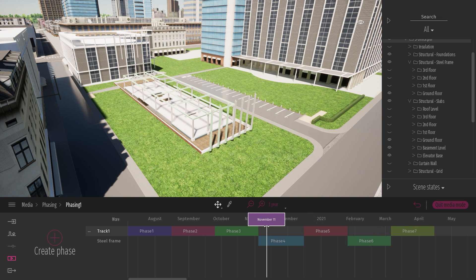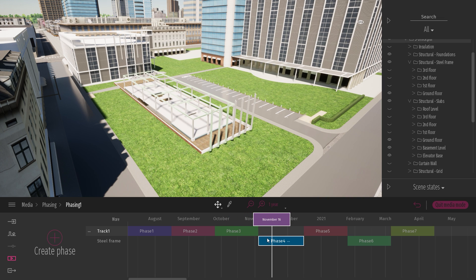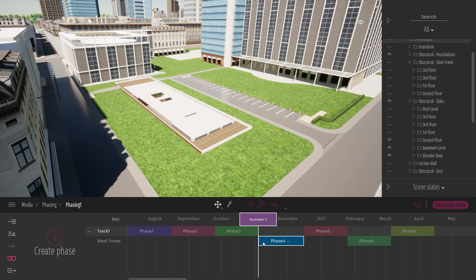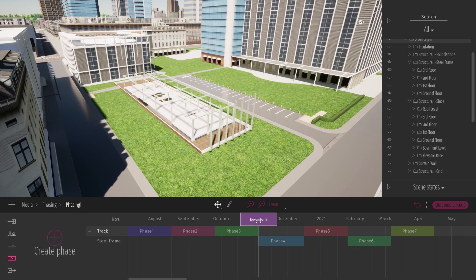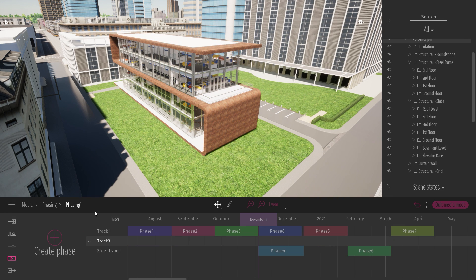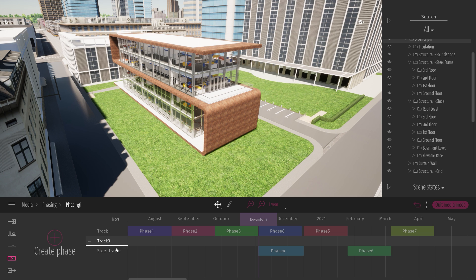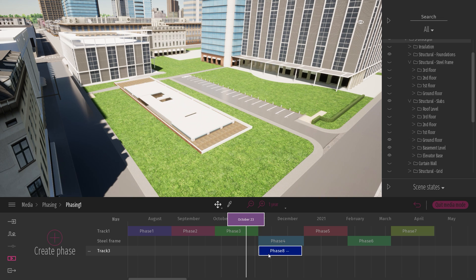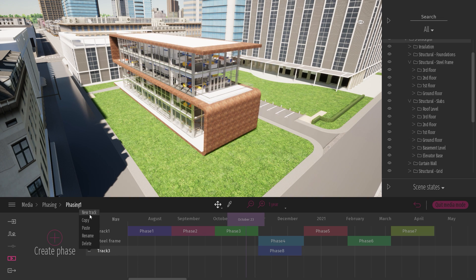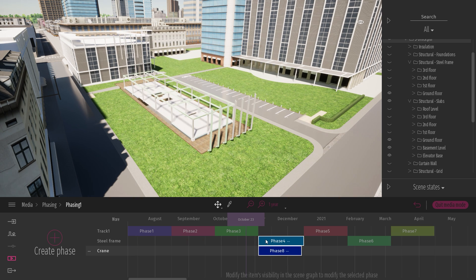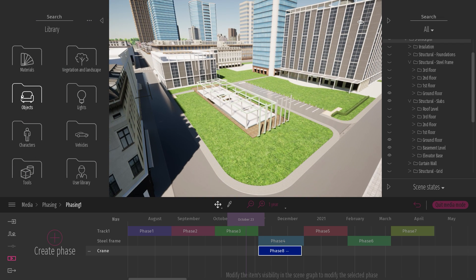Now let's pretend that for my construction, at some point, I need a crane. My crane needs to be present to place all the metallic parts, all my steel frame structure. So my crane needs to be present just before phase number four. So what I will do here is while my timeline is selected, I will click on the plus button. This will create a new phase. I'm just going to move this phase in a new track. So let me come over here, create a new track. I just select this track and move it below my steel frame track. I'm going to move this phase into this new track. And I will rename this track crane.